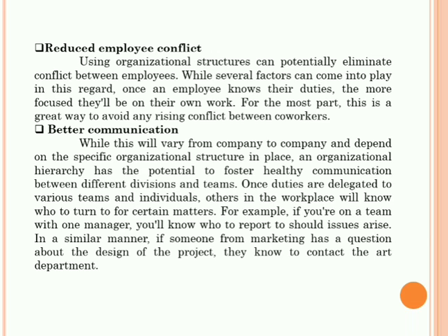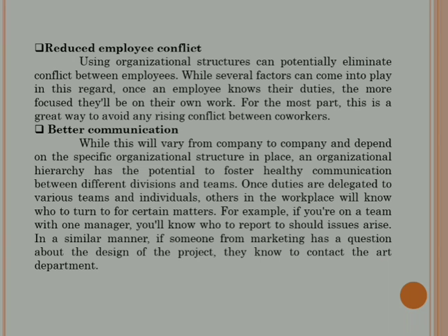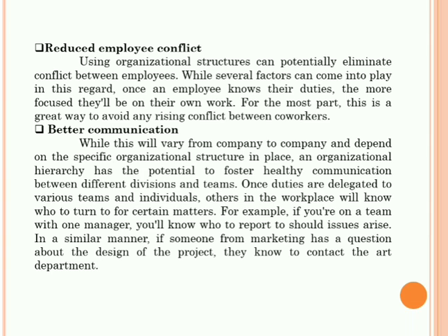While the specialization allows each project component to maximize their productivity to attain their departmental goals, the dissimilarity between these project members may lead to conflict among the members of the project. In general, the greater the differences, the more problems project managers have in getting the work to fit together. This is the specialization we have to consider while designing a project.